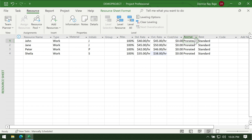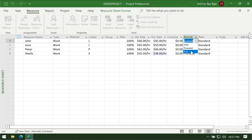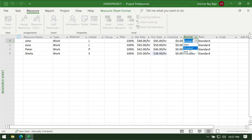The next one is accrual. Does it mean that we start billing the person when he or she starts the work? Or does billing happen when the work has ended? Or is it prorated — like if the task is ongoing and already halfway through, do we pay 50%? Or when the task has started, do we pay all the payments due depending on the number of days assigned? 'End' means billing happens after the person completes the task. For now, I'll just stick with prorated.